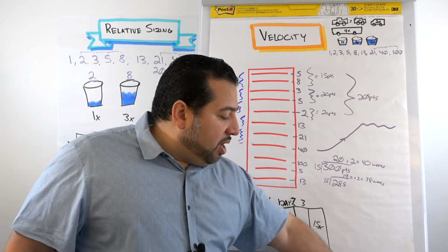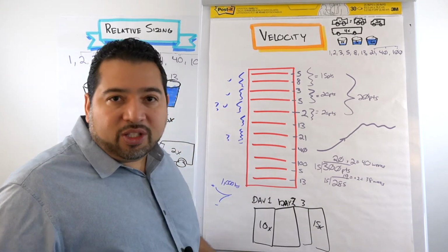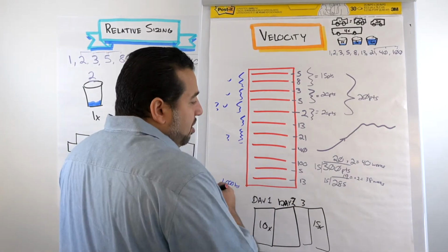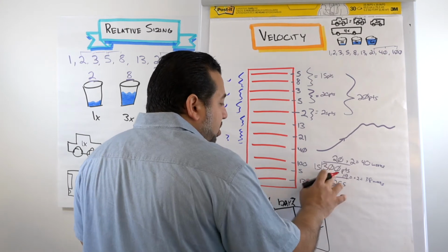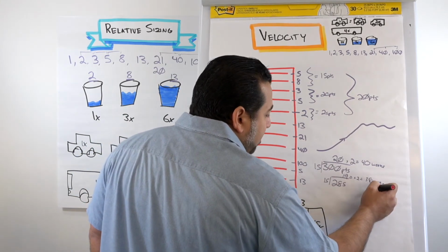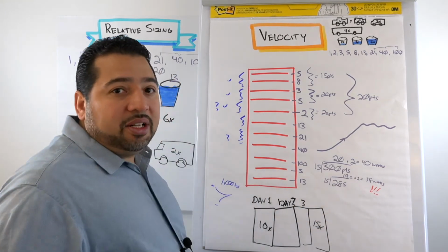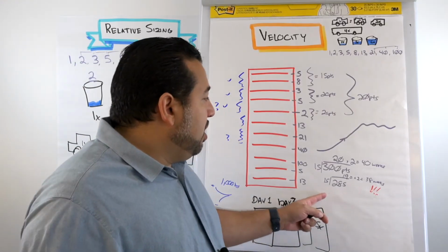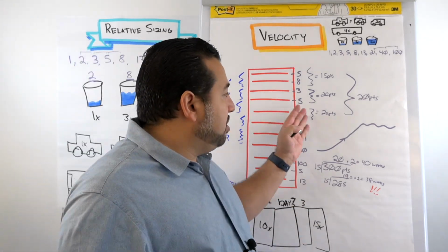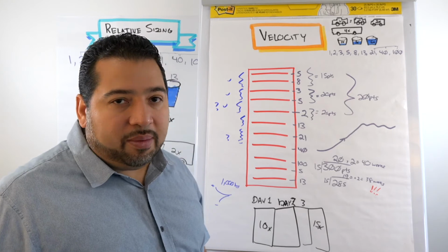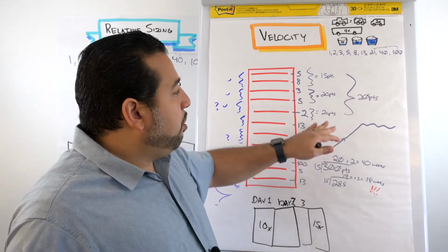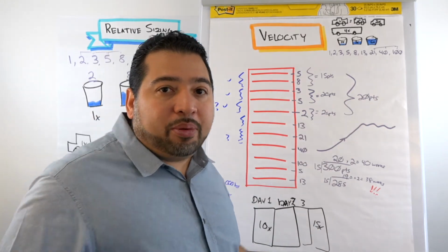Now, there are some pitfalls to avoid. If you end up doing some calculations here, okay, if we do 300 points, 285 divided by 15, 38 weeks, and we're like, that's going to miss our date, and you realize that's going to be an issue, what you don't want to do is pressure the team to change their estimates, and you don't want to pressure the team to increase their velocity. So if you realize we're going to miss the dates, what you don't want to do is pressure the team to increase their velocity and put all the pressure just on that.